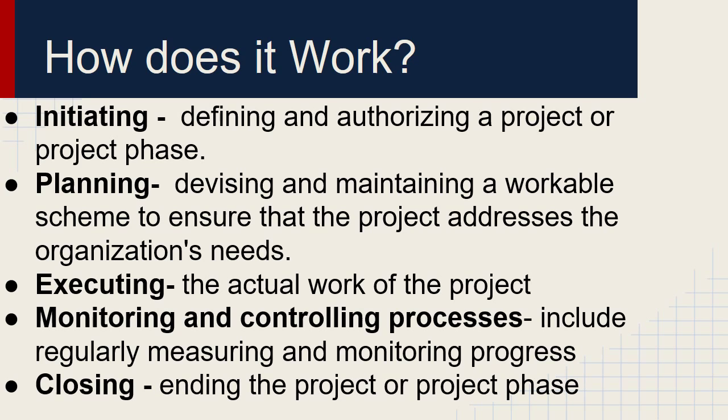An example of this would be a team working on creating a website for a company that gives weekly reports to the project manager. He notices that the team in charge of website design is behind, but the team in charge of payment processing is ahead. He can pull a person out of the payment processing team to help the website design team, to keep the project in check.